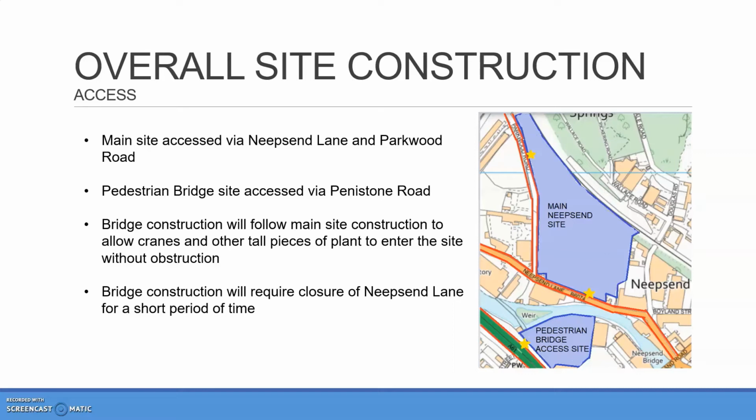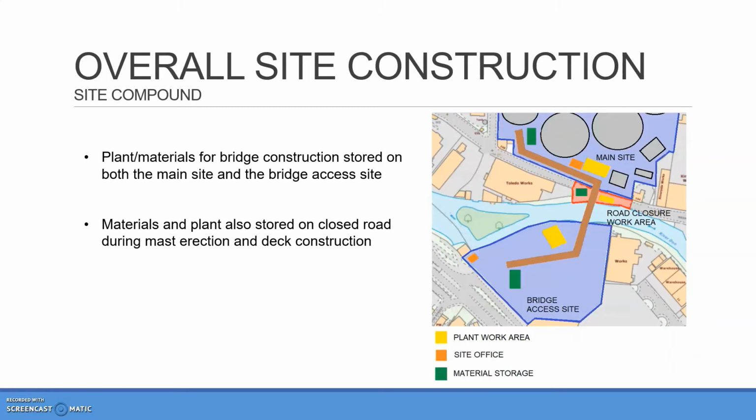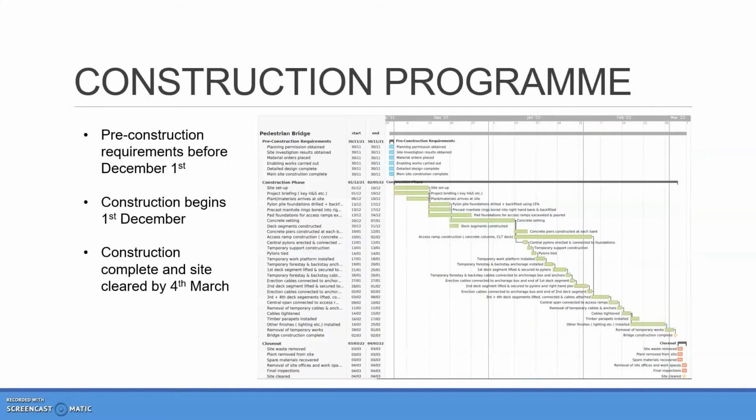Bridge construction will require closure of Neepsend Lane for a short period of time. A general site compound layout is shown, but specific locations will change throughout different phases of construction. A detailed breakdown of the construction programme for the pedestrian bridge can be found in the detailed design report. Construction will take approximately 3 months, incorporating site setup, construction and closeout.